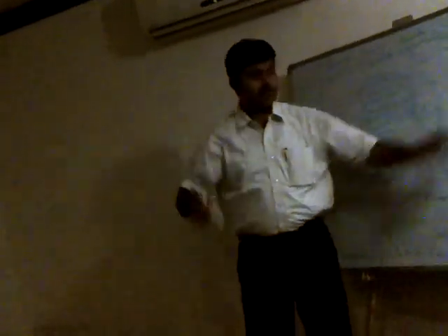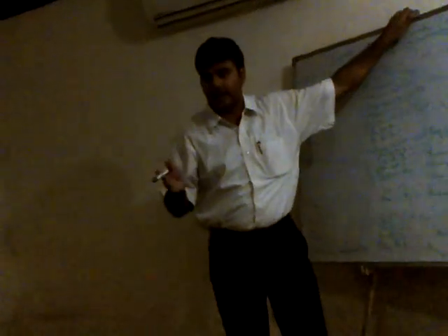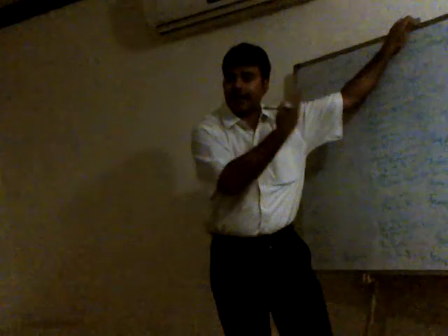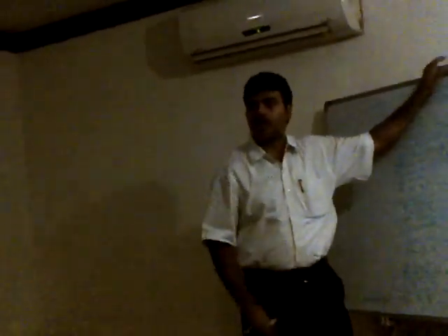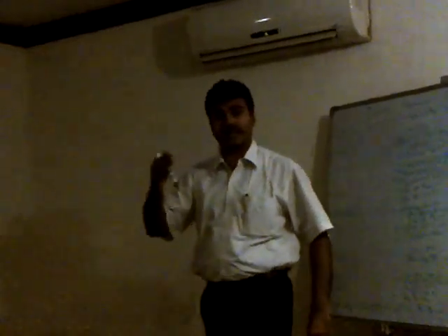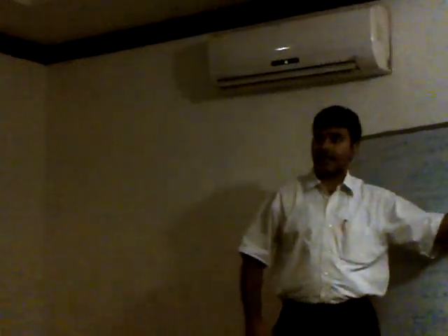Great. Who performs integrated change control? CCB. Okay. Now, in order to perform integrated change control, what would be the most important input? Change request. Right. But in order to take a decision on whether to approve or reject the change request, you also need the plan, and the amount of work which has happened. So the output would be approved change request and change log. In addition, we have change request status update, that is, it could either be approved or rejected.